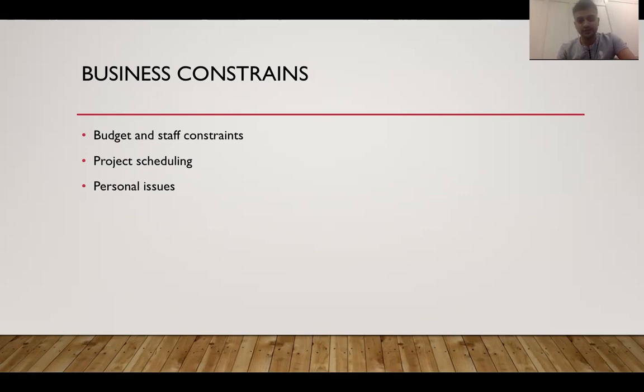About personnel issues, if the staff allocated is not sufficient or they do not have the required knowledge, the project might be doomed. Also, if the availability of the staff is not enough due to vacation or involvement in other issues or other projects, this may result in the delay of the project or maybe failure.